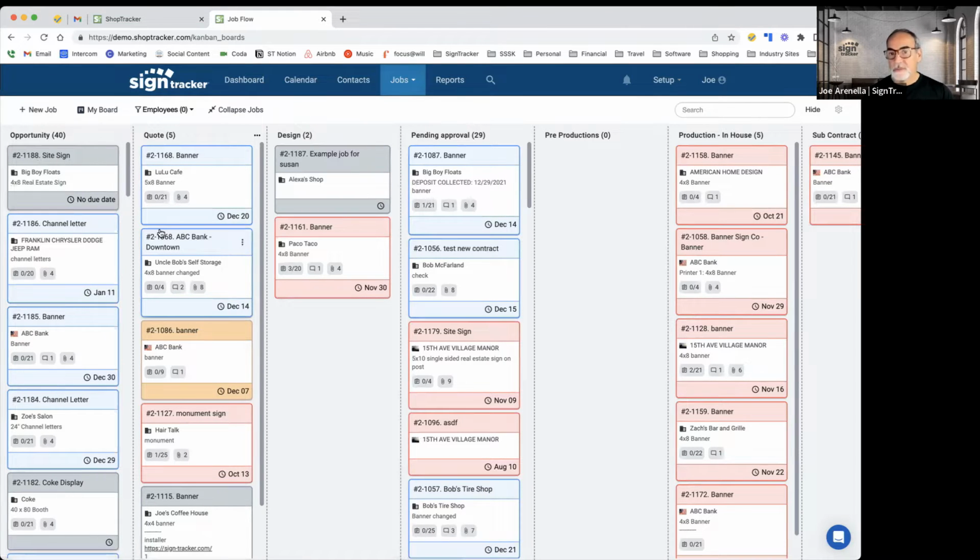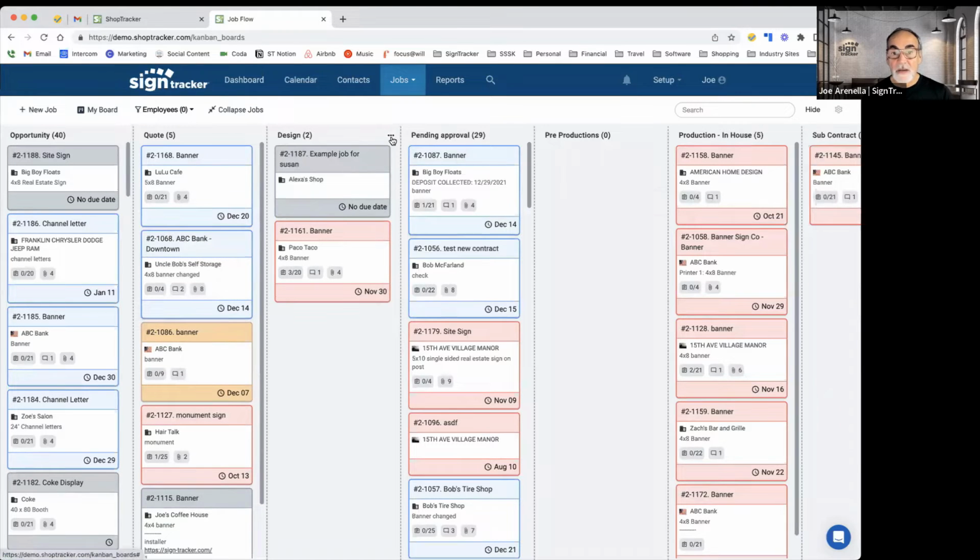if you've never used a Kanban board, a job flow board, or whatever you want to call it, the idea is that you prioritize jobs based on your resources or whatever priority you decide. Some shops are hardcore first in, first out, so you can organize them by due date. At our shop, we tried to be a first in, first out shop, unless one of the owners said, no, you don't understand, this is the most important job on the planet. Bump it, which our shop foreman always wanted to grab a knife and stab us.